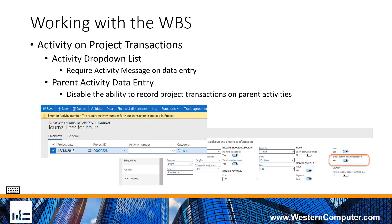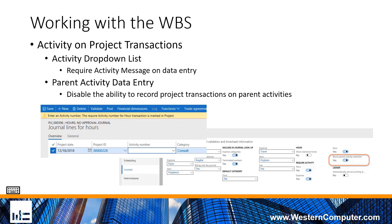Another nice feature here is that you can disable the ability to record project transactions on parent activities. I had a little bit of a hierarchy - a parent task and then three child tasks underneath it. I don't want anyone to record any transactions at the parent task. I want that to be a roll-up. I want all transactions to go to child tasks. And this checkbox comes in handy, blocking the parent activity selection. It disables the ability for anyone to record a transaction at that level.